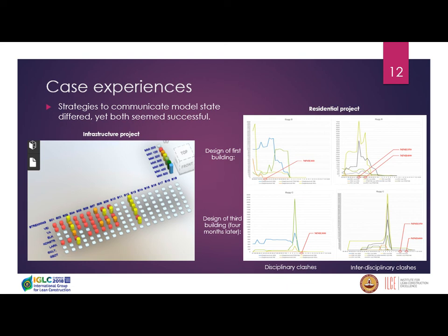So the number of collisions in these graphs are the total number of collisions in a model, meaning that they include a lot of collisions that might have no relevance to constructability. But because the relevant MMI deliveries here relate to having no relevant collisions, we should at least be able to observe a significantly declining trend towards these maturity deliveries if the model progression was committed as it should, which we did not see during the design of the first building at all.